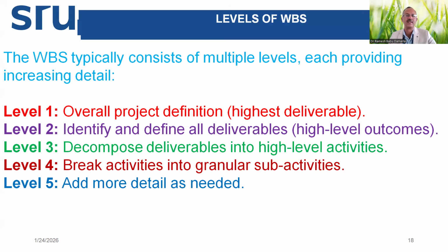Then after that, level 3 divides the mechanical works, like get the equipment, deploy the equipment, deploy the operators. Like this, we subdivide each one. Level 4 is breaking the activities into granular or sub-activities. Level 5 is more nano level. Okay, more details are given.